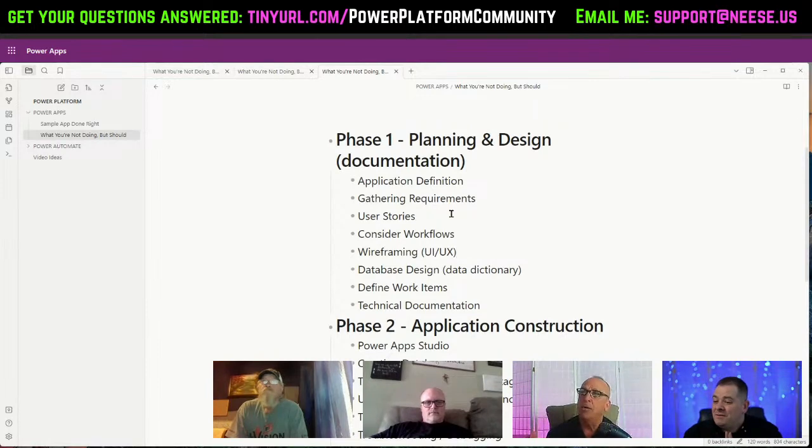Right. So I would always go through the levels of planning, starting with phase one. By the time I got out of phase one, I could probably give them a really good definition. But really, by the time I get done with the workflow stage, I've got down how much it's going to cost. And I got to a point where I would just pad it by 20%. Whatever I think it's going to be, I do that without thinking about it. I'll just pad it by 20%, because I guarantee you it's going to go up 20% easy. And I'm still coming out short, probably.